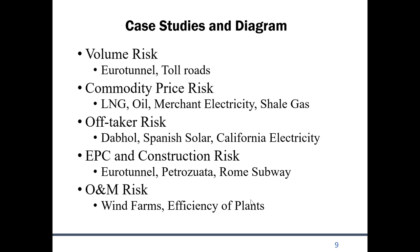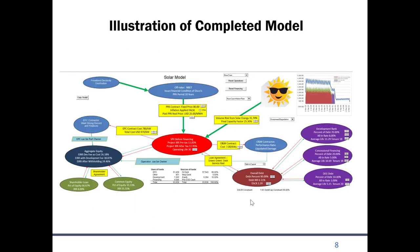A very famous project in India built by Enron - considered a wonderful company at the time - charged a very high price and the off-taker simply said it won't pay. A similar story with Spanish solar projects. Don't think off-taker risk or political risk only occurs in countries you might think aren't quite so rich. There are also EPC contract problems with cost overruns, construction delays like the Rome subway, and O&M risk.